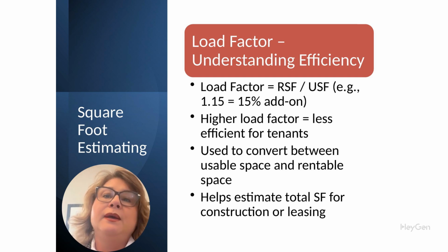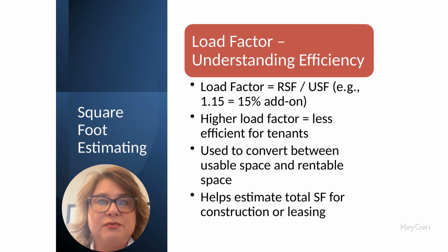Why does this matter? For tenants, a higher load factor means they're paying rent on more space than they're physically using. It's less efficient from their perspective. But for you, as an estimator, the load factor helps in 2 key ways. It allows you to convert between usable space and rentable space, depending on how your project is structured. It helps you determine the total square footage needed for the building when only usable space is provided.